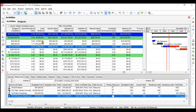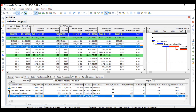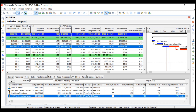Cost Variance shows how much you are varying in cost with respect to your Earned Value. The formula is: CV = EV minus AC (Earned Value minus Actual Cost). For the third activity, Earned Value Cost is 4,29,000 and Actual Cost is 8,60,000, so Cost Variance is approximately negative 4,30,000, showing the activity is over budget.